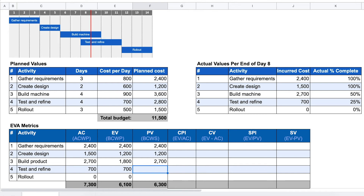For activity four, test and refine, we should have accomplished one day out of four, and each day is worth $700, so that's $700. For activity five, rollout, this is still ahead in the future, so the planned progress at our current point in time is 0% — that's $1,500 × 0% = $0. This gives us a total planned value for our project of $7,000.